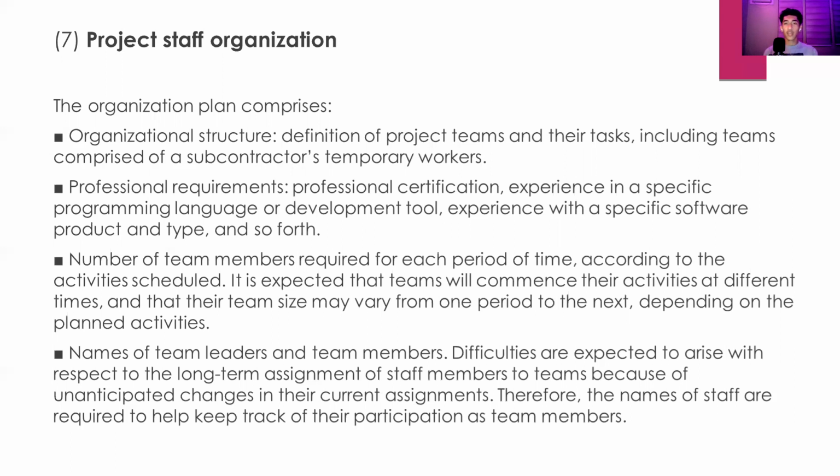So professional certifications, experience in a specific programming language or development tools, experience with a specific software product and type, and so forth. Third is the number of team members required for each period of time according to activities scheduled. It is expected that teams will commence their activities at different times and that their team size may vary from one period to the next, depending on the planned activities.